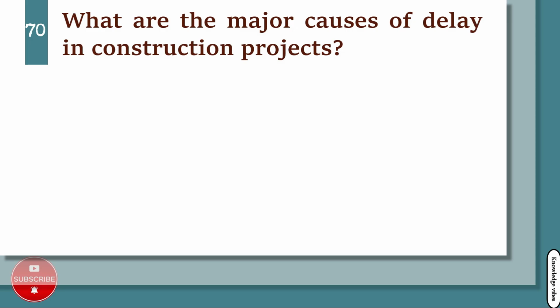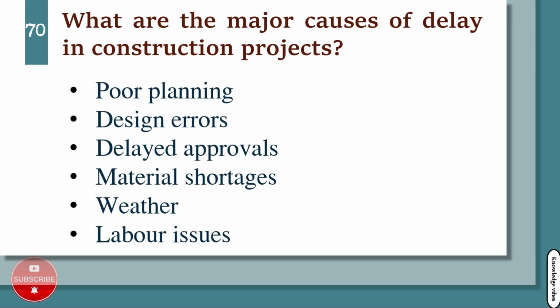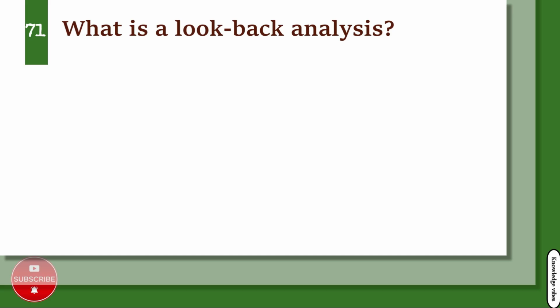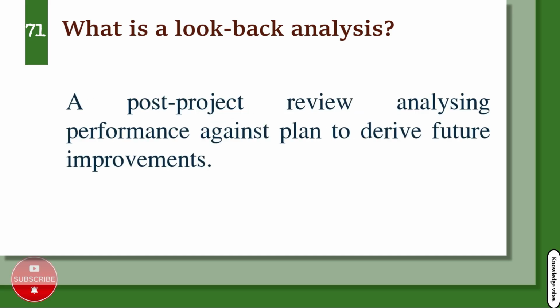What are the major causes of delay in construction projects? Poor planning, design errors, delayed approvals, material shortages, weather, labor issues. What is a look-back analysis? A post-project review analyzing performance against plan to derive future improvements.